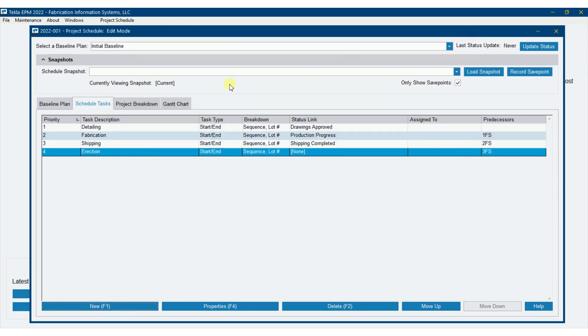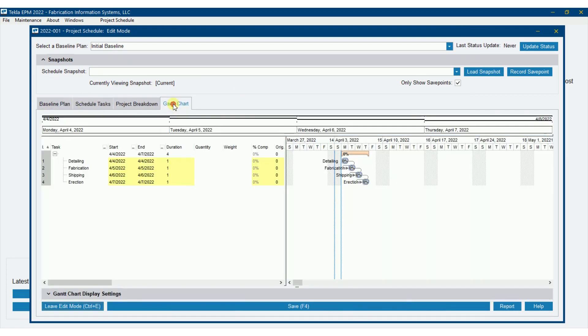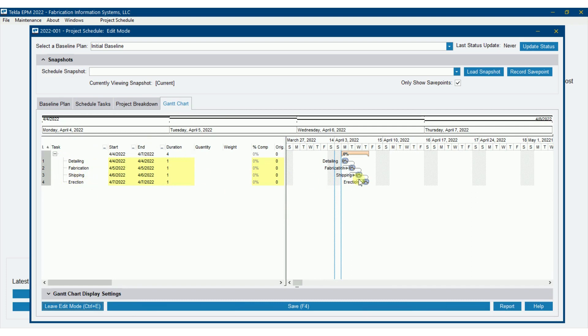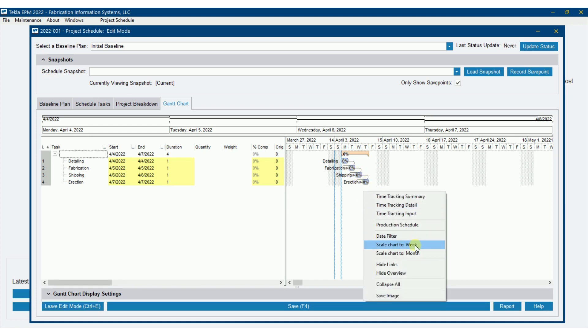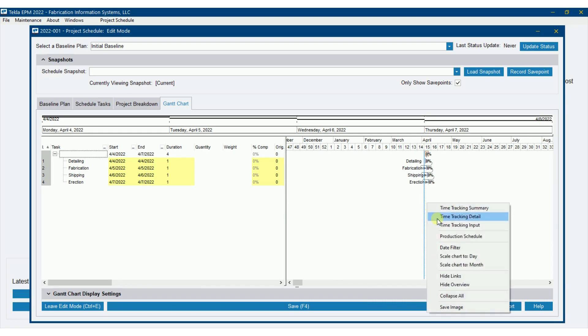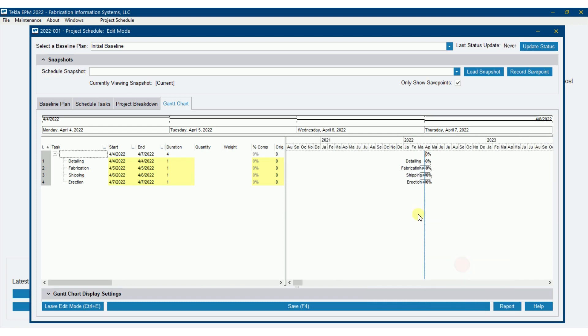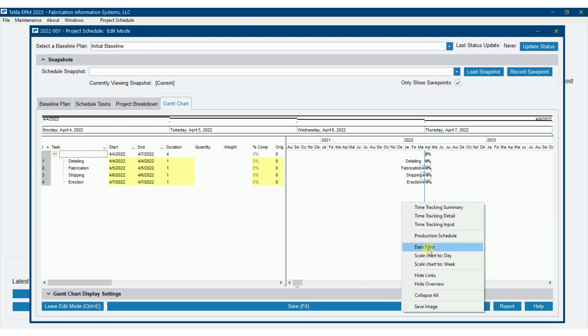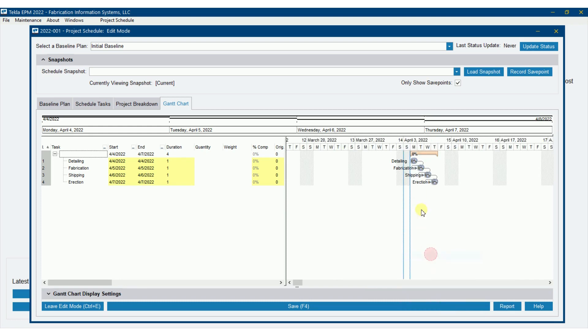So let's go see what we've got on the Gantt chart. So there's all my tasks set up on the schedule tasks tab. And now on the Gantt chart, you can see that I've got four tasks as well. Notice they're all linked together. So fabrication is starting after detailing. Shipping is starting after fab. Erection is starting after shipping. I'm going to right click here, scale this down. Well, it's scaled to day right now. I could scale that to week. I could scale that to month. But day does seem to work better. We'll leave it at that as we go through.